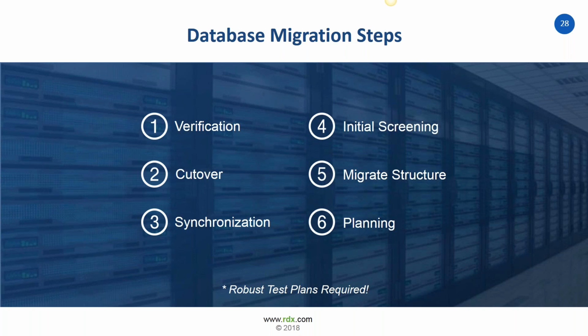You also need to determine if you want to migrate the database to the cloud in one step, or you want to seed it and then keep it in sync until you perform the final production cutover. Some of these steps I'm showing may be combined or be removed entirely. Depending on the mechanism you choose, you can migrate the database structure and the data at the same time. You may choose to migrate the database data and cut over after you verify it's been successfully moved to the cloud without setting up synchronization. What steps will you perform to verify that the database has been successfully migrated to the cloud target?